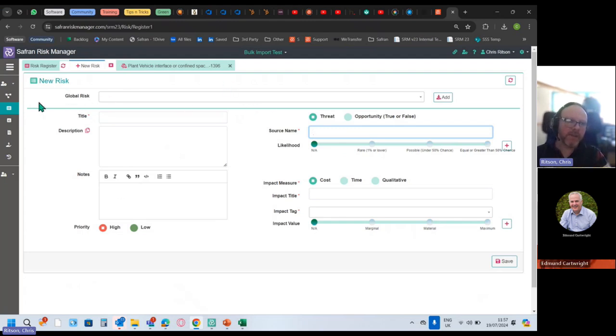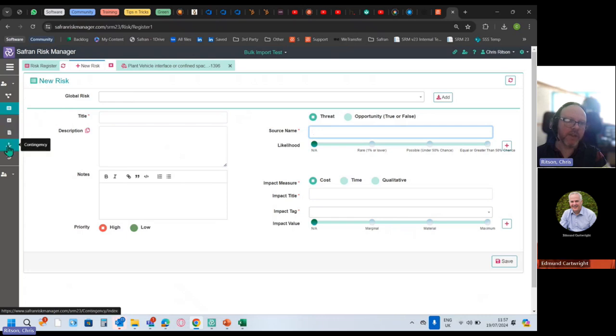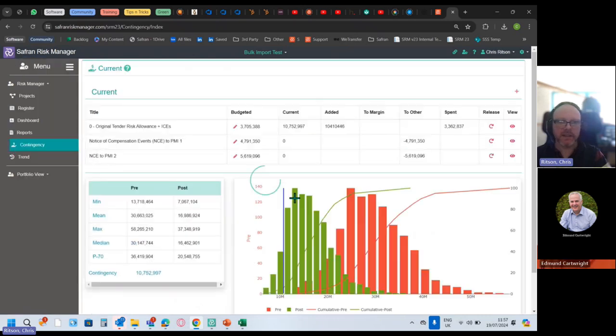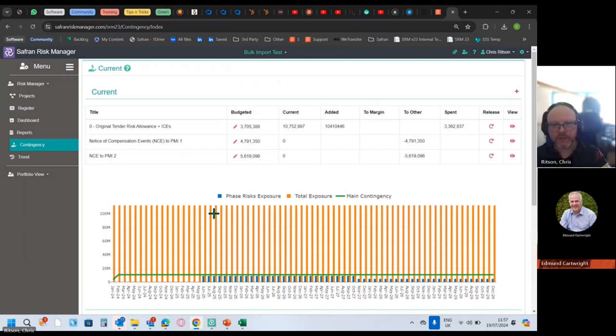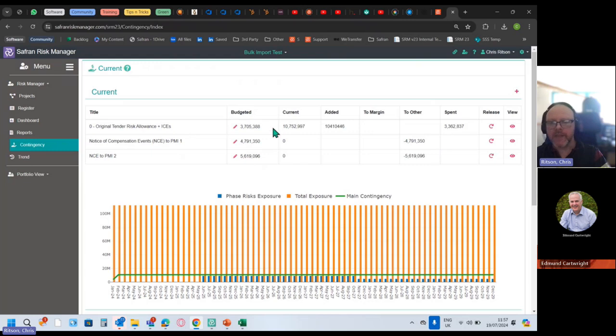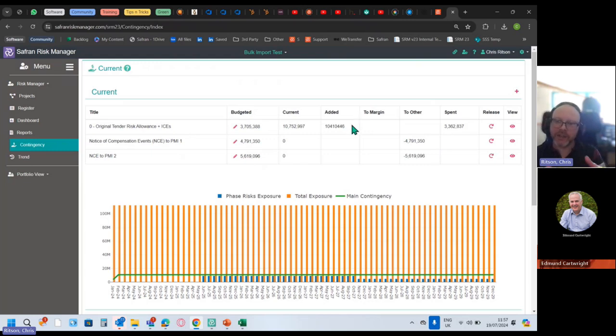That's risk capture, risk assessment. We've already seen the dashboard is the main one, but the other secondary main one is the contingency. You can set up contingencies, multiple if you want or just have one, and then there's an audit trail around the release of contingency so you can manage that and show that happening as your project matures.